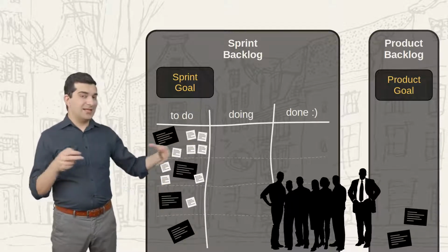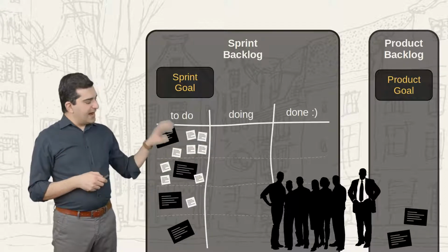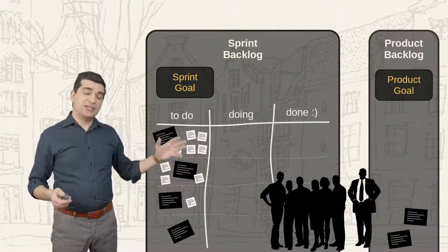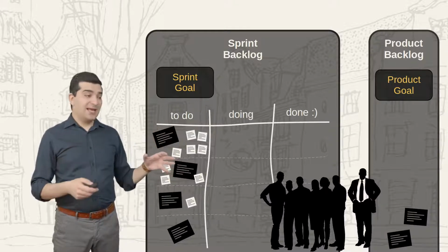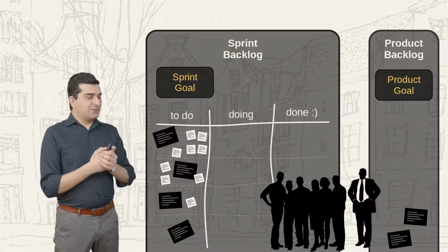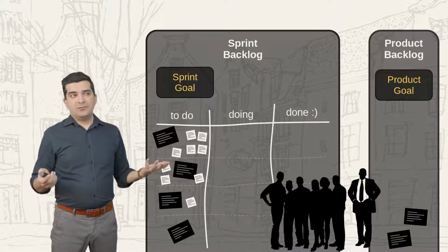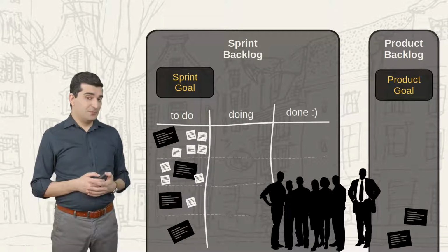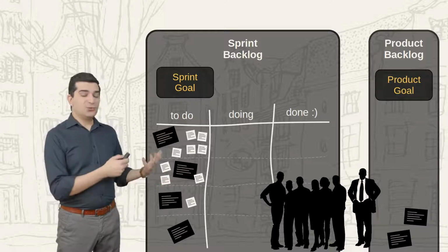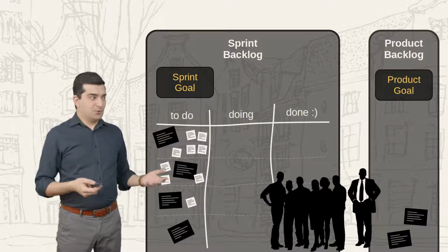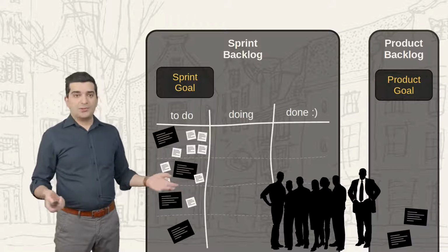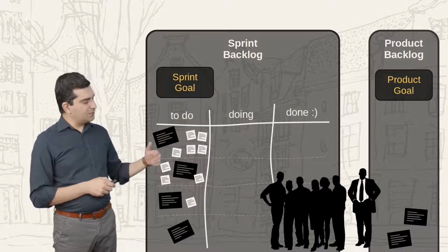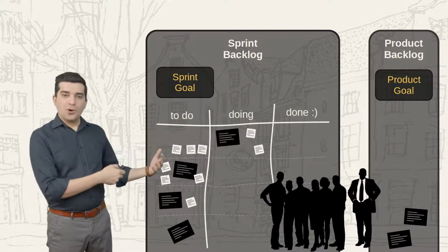And you see, our planning is continuous. We don't add all those details to the product backlog because then the product backlog will be huge, extremely huge, with too much detail. And practically for something you want to do in 6 months from now, there's no point in spending a lot of time and detailing that because no one knows what's going to happen. Maybe in 2 weeks from now, you want to remove that. You don't want to work on it. So what's the point? You will only plan it when it's time to work on it. We will do all of these, and then we start working.